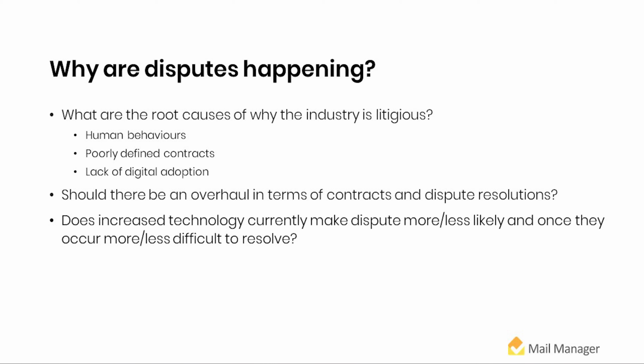And so when you have that kind of a relationship, it's critical, obviously, that you not only have a good system of contracts, which unfortunately in this industry, perhaps just due to historical behaviors, isn't necessarily always the case. And when you don't have a clearly defined contract or your contract doesn't have proper buy-in from the on-site team, so you've got a team who's either bidding tenders or preparing sole source contracts that aren't necessarily then downloaded to your on-site team so they can behave according to that contract, then problems arise.